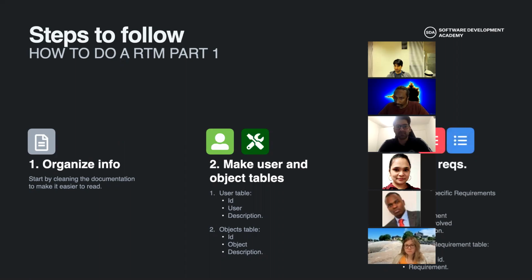Once you finish this one, we move to the requirement tables, and you can see 3 colors now. In the first optional lecture, you saw 2 colors, the red one for the functional and the blue one for the non-functional. But now I'm making a third icon, a dark gray icon for the business requirements. And the business requirements table requires an ID, the requirement itself, the roles involved.